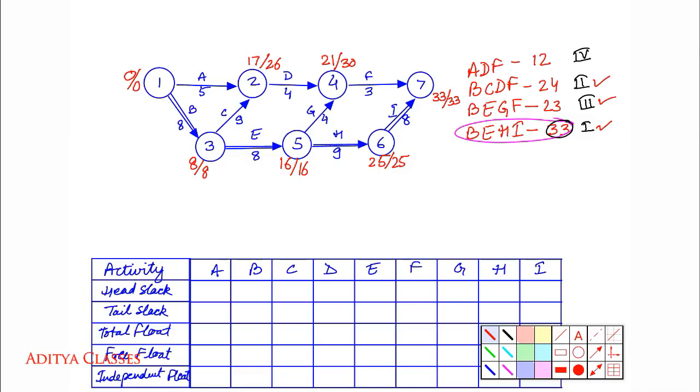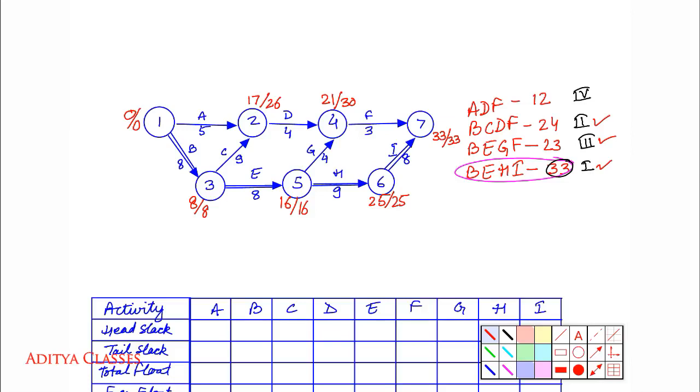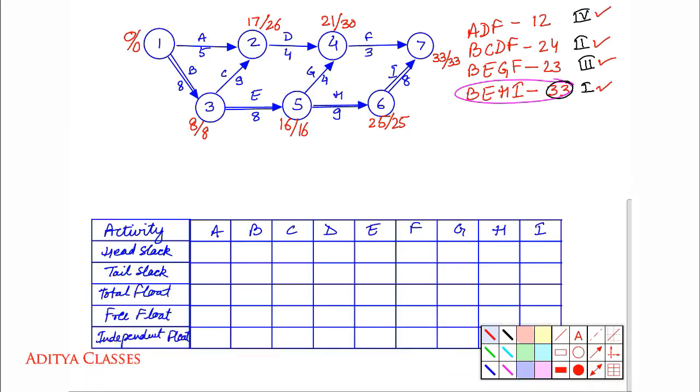Fourth one is ADF, the top path. Let us see: 0 plus 5 is 5. No, there can be no 5. Instead it will be 17. 17 and 4 is 21. 21 and 3 is 24. Should I write 24? No, it will be 33. Then the backward pass: 33 minus 3 is 30. 30 minus 4 is 26. 26 minus 5 is 21. No, there will be no 21. Rather it will be 0, the smaller of the values. So now we are done with forward pass and backward pass on all paths.